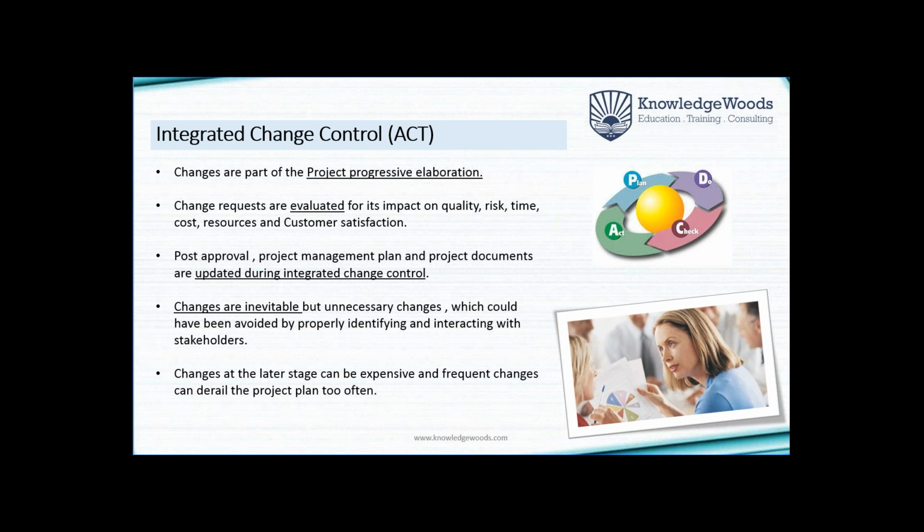As mentioned, changes are inevitable, but unnecessary changes which could have been avoided should be avoided. Changes, however, are inevitable. There will be some; that's the nature of projects. Changes at a later stage can be expensive to implement, and frequent changes can derail the project plan as well. So changes need to be done. They are inevitable, but you should also guard against unnecessary changes.